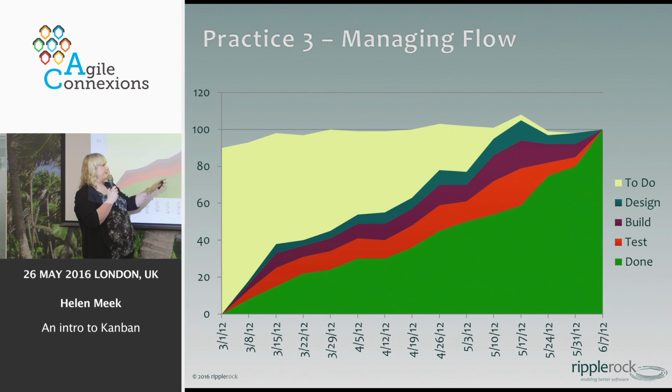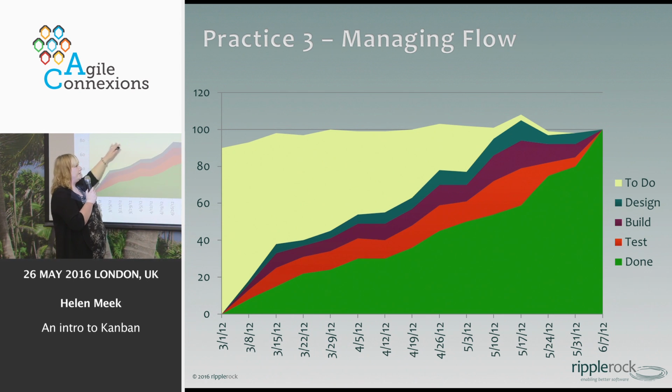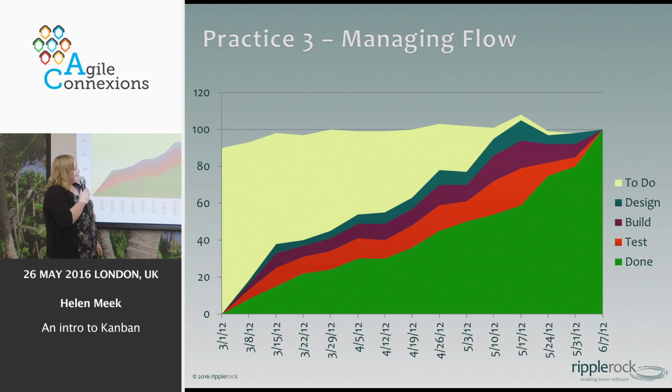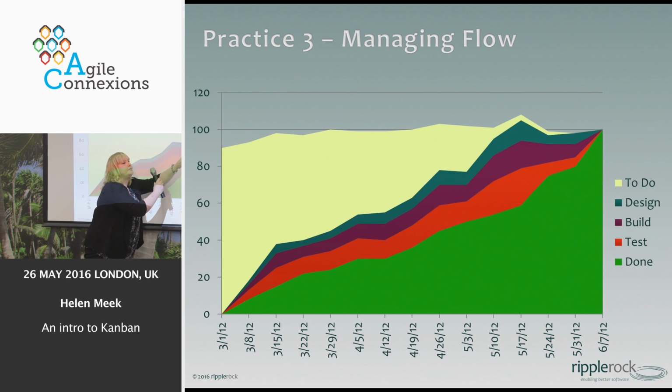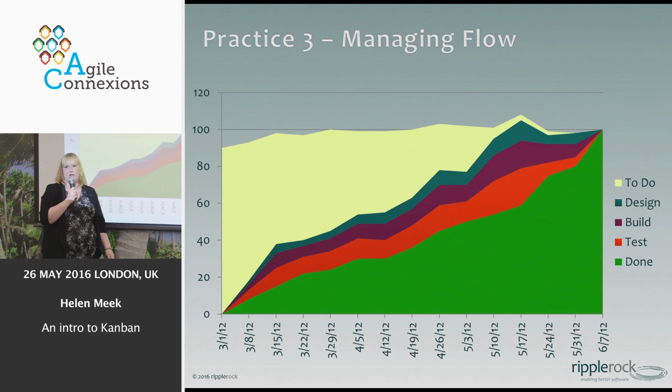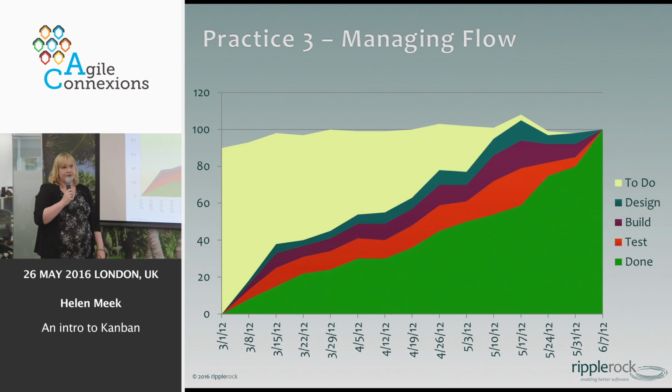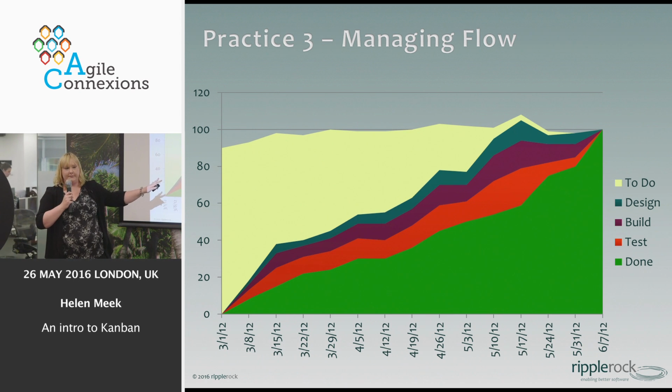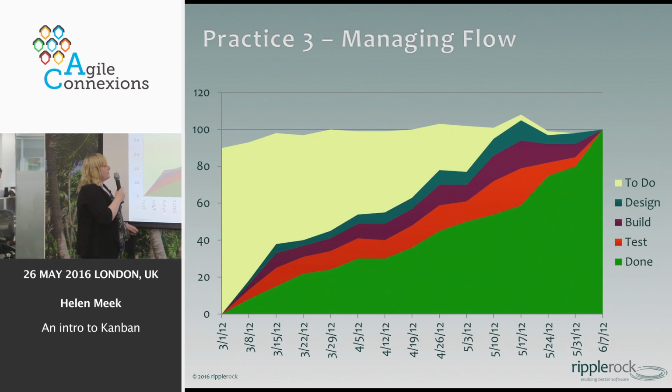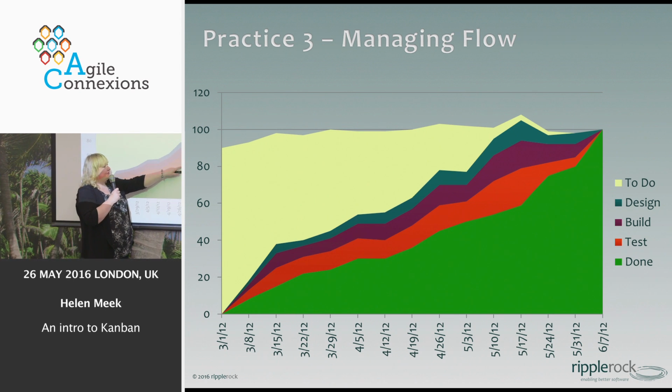So the green represents the done, the to do is my queue here and it's the yellow, and everything else in the middle that is in flight. Now, has everybody heard of Aquafresh toothpaste? Yeah, the thin minty stripe. Ultimately, that's what your CFD should look like, okay? Nice, equal, thin, minty stripes that move in an upward direction to the right, okay? If someone stood on the tube and it's all gone crazy, a bit like your WIP limits, it's all gone crazy. So how do I know how thick these should be?